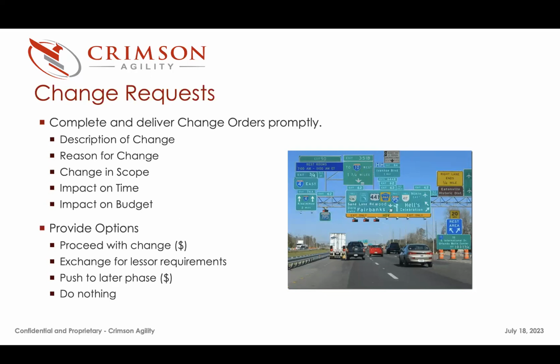We recently did a change order for Frontier that included several changed or new requirements. It also included additional PM and QA time, as well as additional overhead time. So it could include several items. It doesn't have to be item by item.